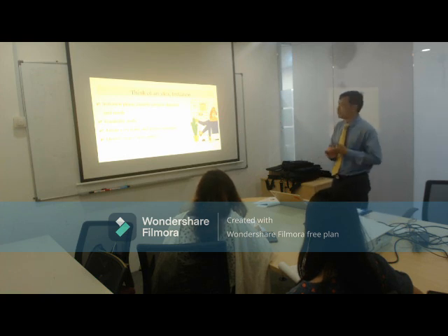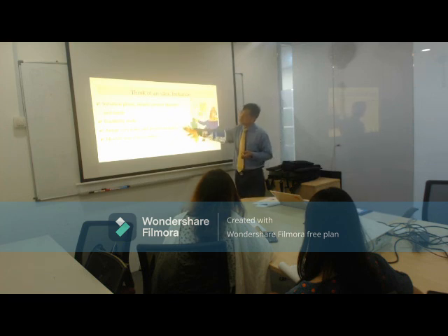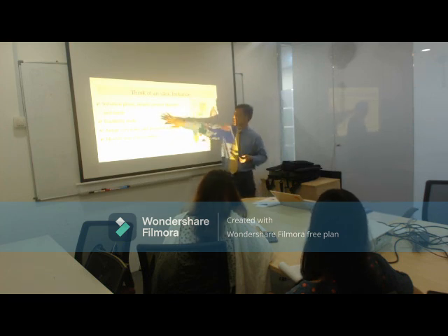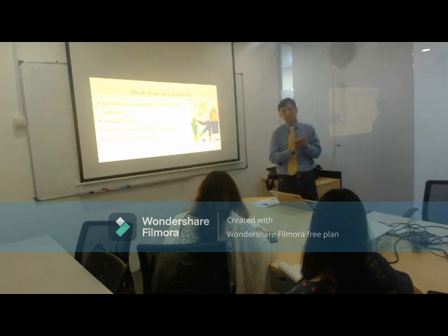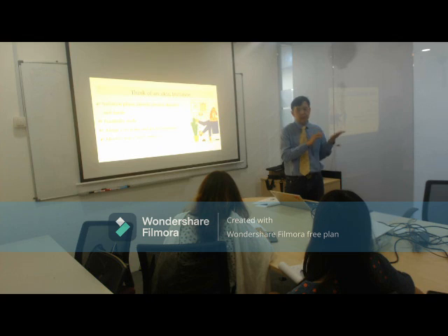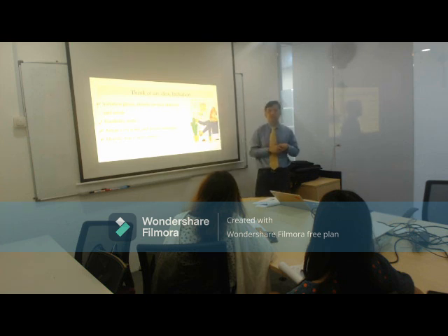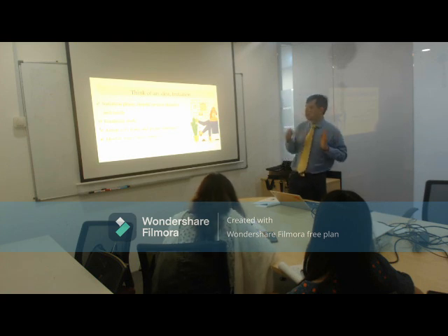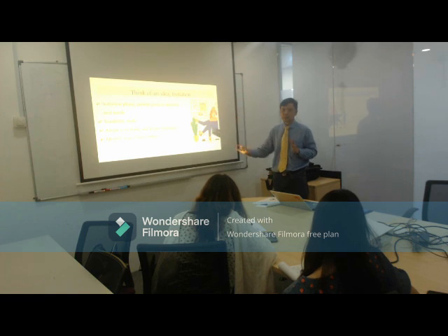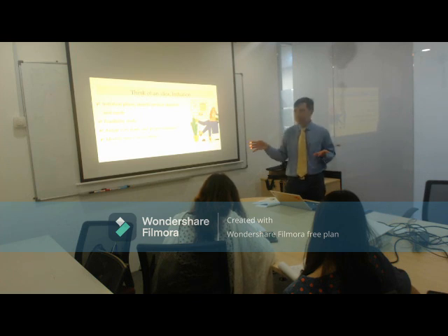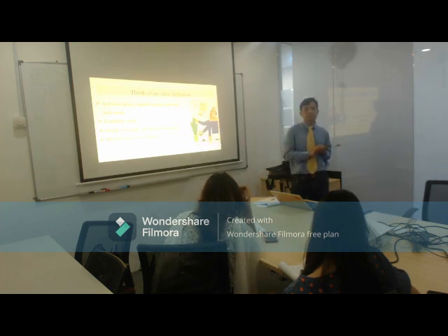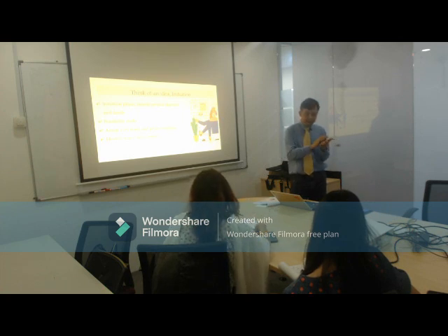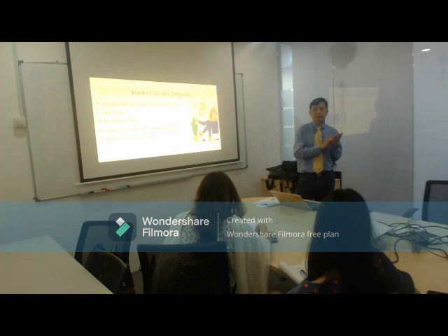It's just the beginning phase. And all of this requires you, for companies, to have documentation. For example, a feasibility study, you may have to have a document to say what studies you have done, what the report is, what the cost is. Above here, you may need something called the PIN. PIN is known as Project Initiation Note. Somebody says that we want to start initiating this project. In companies, normally it's through a meeting, they agree, oh, we have to implement a new software for our bank tellers.